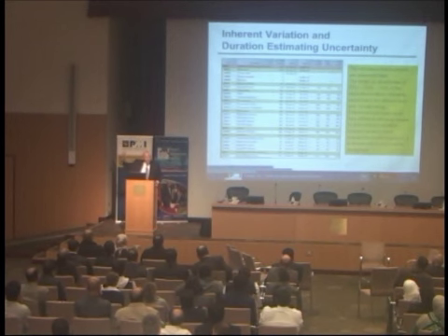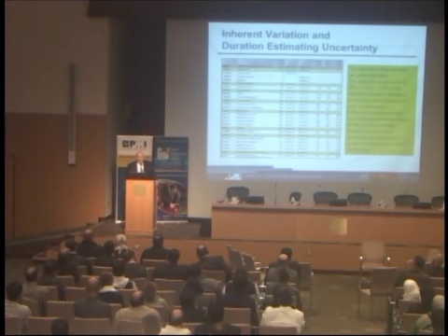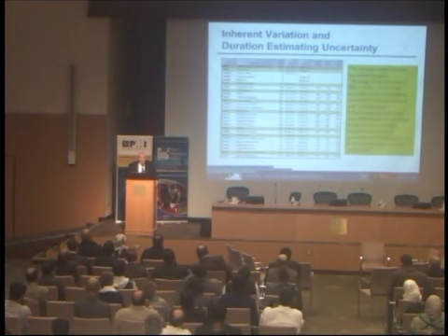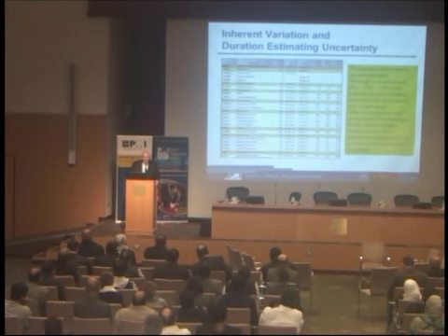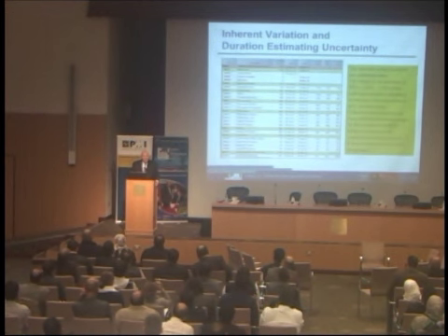If no risk occurred, no risk event occurs, your projections for duration still are not accurate because human beings and organizations can't do the same thing in the same time reliably twice in a row. There's a little bit of variation, maybe 5 to 10%. And in fact, sometimes the variation depends upon the type of activity. So the variation may be different for construction, than for engineering, than for procurement, than for installation, than for hookup and commissioning, than for drilling.